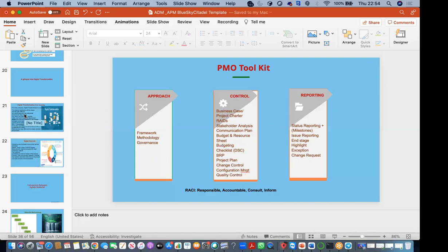But when we talk of project charter itself, it is talking about the product and end-to-end delivery of that product, including the budget that you have for that project. And your project charter is a working document. It's not something you just do once and that's it. It's a working document. If any alteration, if any changes come, you want to make sure you capture it in your project charter. So we need to know all of this.